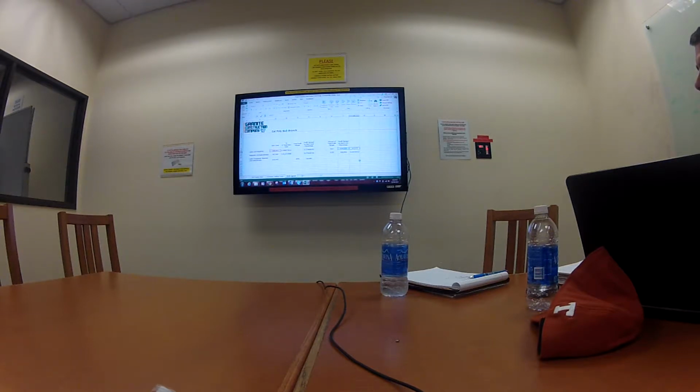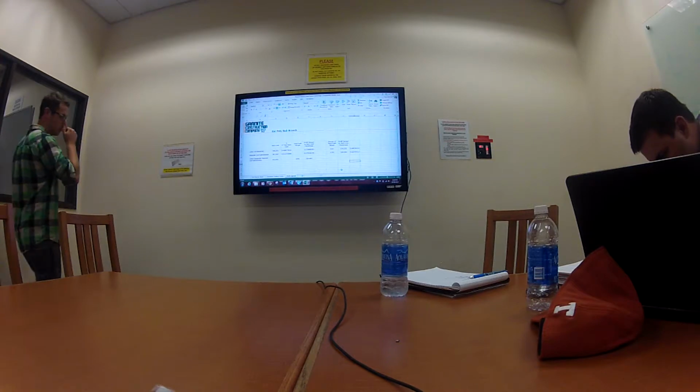Why? So normally what we do on a lot of jobs, the standard practice that I learned from Granite, was that we would do 30%. When we spread it, we would do 20% on labor, 15% on equipment, then 5% on subs, and 10% on materials. And that's kind of how we do it in our bid closing program too.